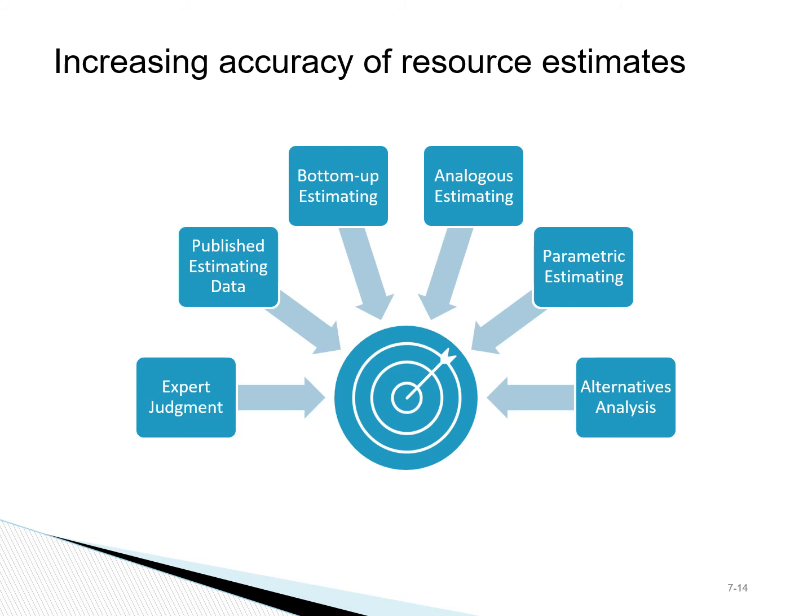Expert judgment, as suggested by its name, is the estimate made by experts for that particular activities that we are considering. Sometimes there are estimating guides available. For example, for EHR systems, you can look up what's the average cost of implementing an EHR system. Sometimes we need to break down an activity to smaller pieces to be able to estimate required resources to develop a bottom-up estimate, building up from pieces.